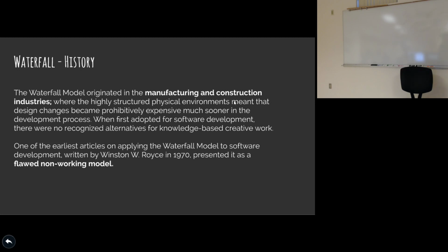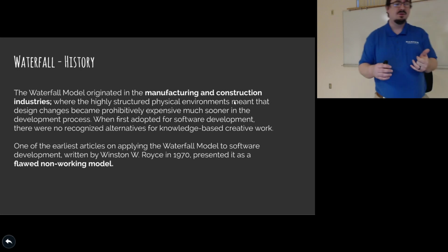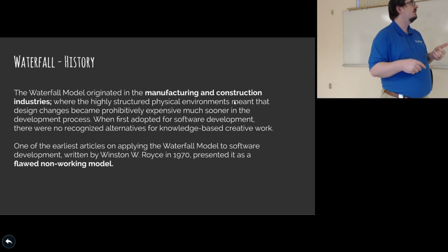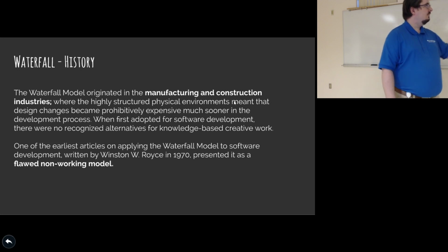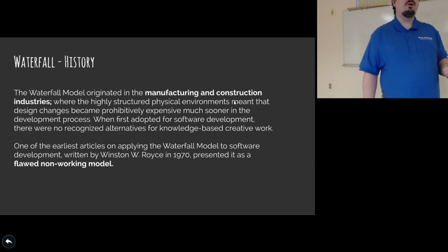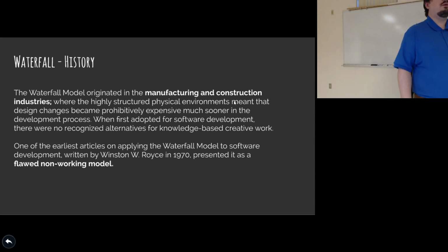So it works under these kinds of circumstances. It assumes that you have a highly structured environment, and changes along the way are very expensive, so you want to figure them out ahead of time, right? Changes in software are not always that expensive.